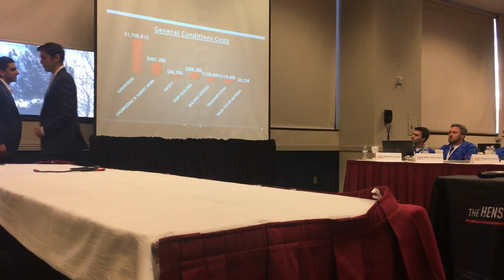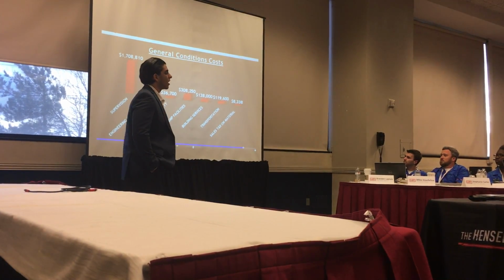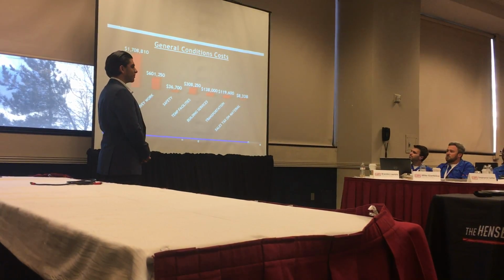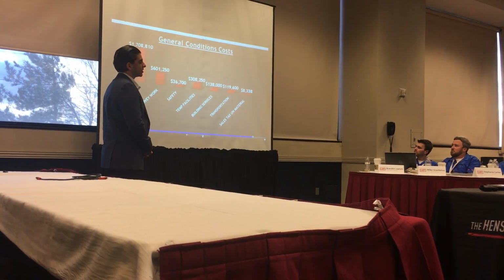Thanks, John. So we have our general condition breakdown here. That's our indirect construction costs. Mainly it's supervision, engineering, and survey work. Total comes out to about $2,900,000. That's $100,000 lower than what we had in our design development budget.